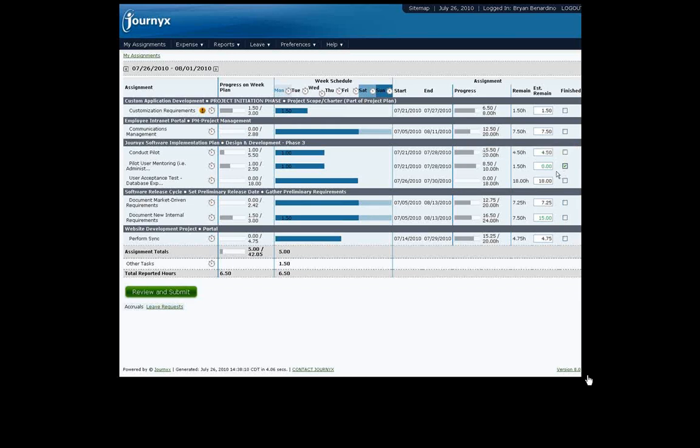If I call my appointment and I say, well, I've got another 35% of my trip to go, what good is that? What I need to be able to say is I've got another 15 miles to go. It should take me about 22 minutes or so to get there. Tracking actual time, cost, and completion estimates helps me do that with my projects. And remember, you can't control what you don't measure.